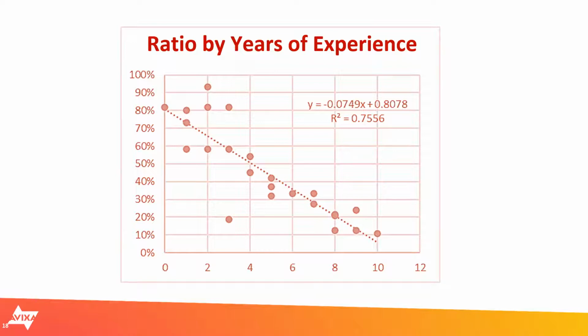You don't really have to have the knowledge of what this is actually doing. What you can do is build the measurement that you want to take, the experience, and then a percentage. In this case, it was the number of change orders as a percentage of the total number of projects that were actually built. So we had a ratio of how many change orders were processed by these individuals, and the direct correlation to their experience. You just take those two columns and create a scatter chart. That was it. And then the scatter chart has an option to create the coefficient line.